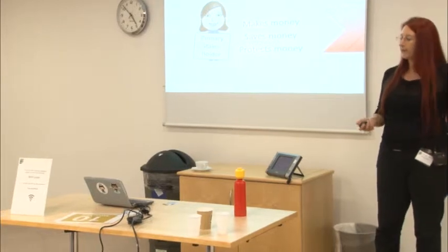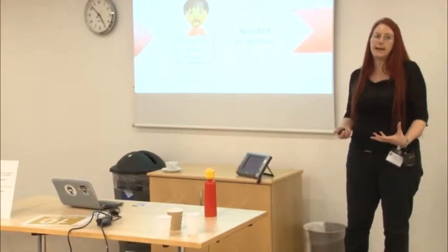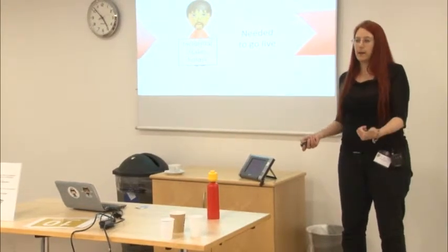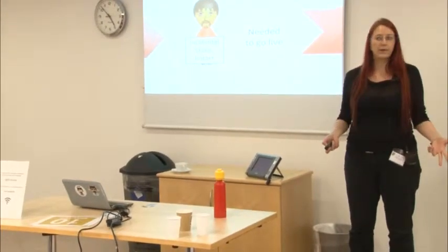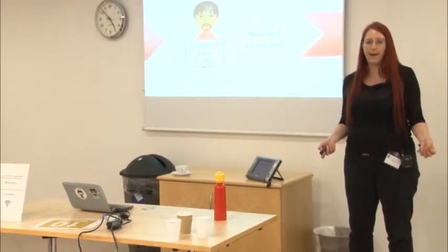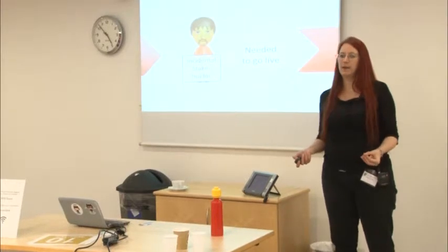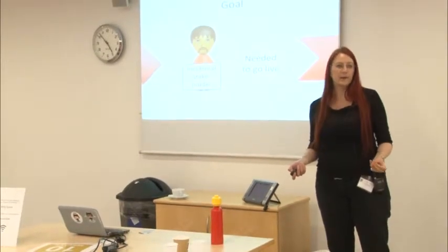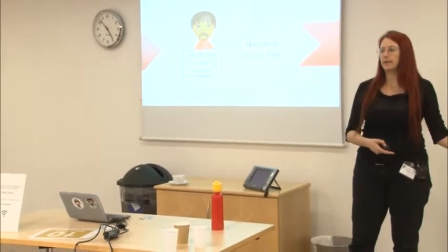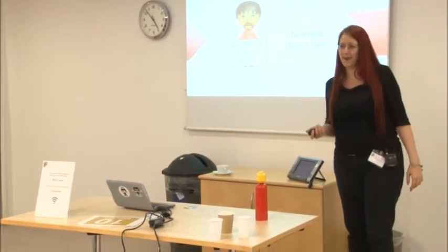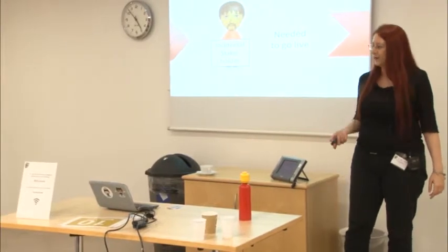There are also other stakeholders whose goals need to be taken into account if you're going to go live with that project. So legal guys, architecture, the fact the code's got to be maintainable in 5 years. Security. Marketing sometimes. The fact that you need to train the users. There are a ton of things that need to happen. I'm working with a project at the moment, only 10% of what we're doing is actually code.